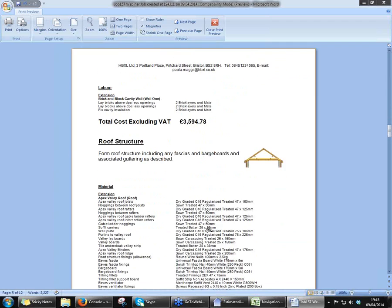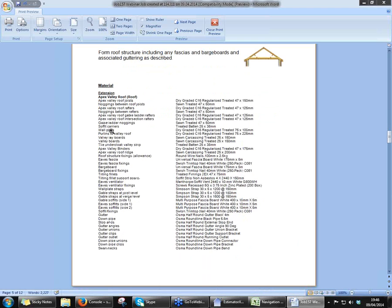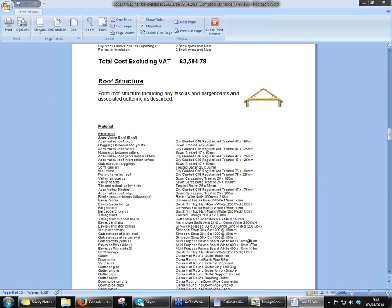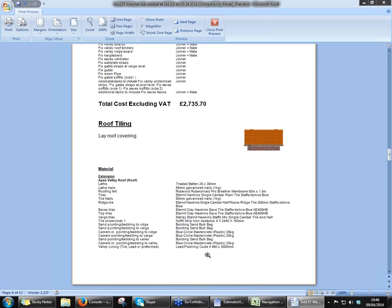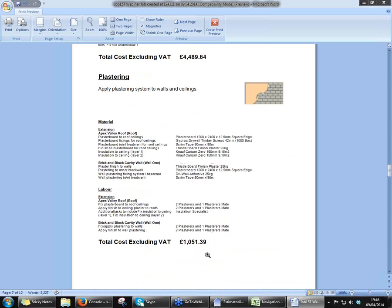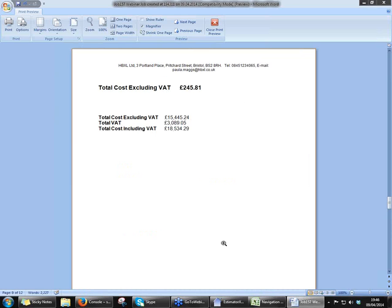So we've got the Brickwork Shell, the Roof Structure. You can see that nothing's been forgotten here — we've got things like your wall plate and your soffit carriers and things that we didn't necessarily put a cost to. The software knows you're going to need to cost those out, so it's added it in for you and put a price against it. There's your labour, your roof tiling. We've got the plastering work there and some more internal decoration. Now we've come to the end of the estimate. Even from those few calculators, we've got about eight or nine pages. Your VAT is shown as a separate entity and your profit is hidden away — you certainly don't want Mrs. Bloggs knowing you're winning 30% profit off her job. So that's hidden away nicely for you there so the client doesn't need to know what percentage you're working at.